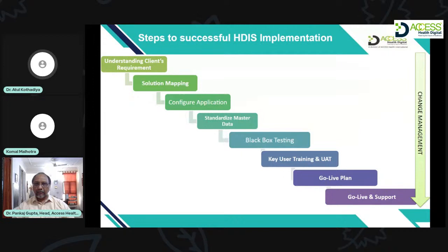It took us 2 days to realize that the server was in a data center, which is Tata data center in Mumbai, and we thought everything is right there. And then after 2 days, we asked them for the network diagram. We studied the network diagram, and what we realized basically, there were two racks in the data center where two servers were located, and there was a pipe connecting both these servers, and that pipe was getting choked.